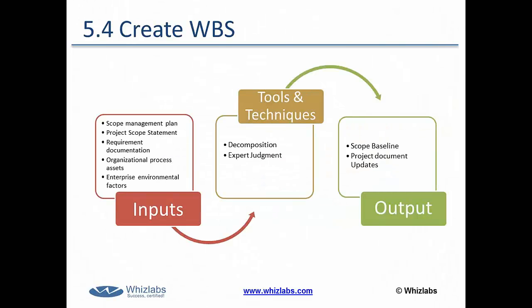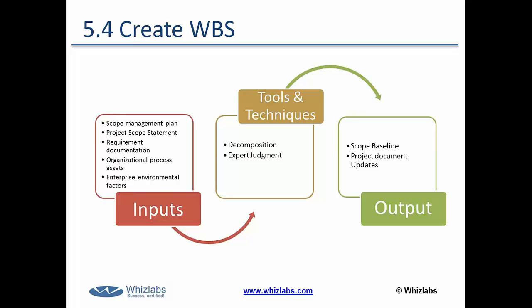Let's move to the next process in this knowledge area: Create WBS. The objective of this process is to create a scope baseline, which is a combination of the project scope statement created in the previous process, along with a work breakdown structure and a work breakdown structure dictionary. The work breakdown structure, commonly known as the WBS, is a breakdown of the entire project scope and is the primary output of this process.